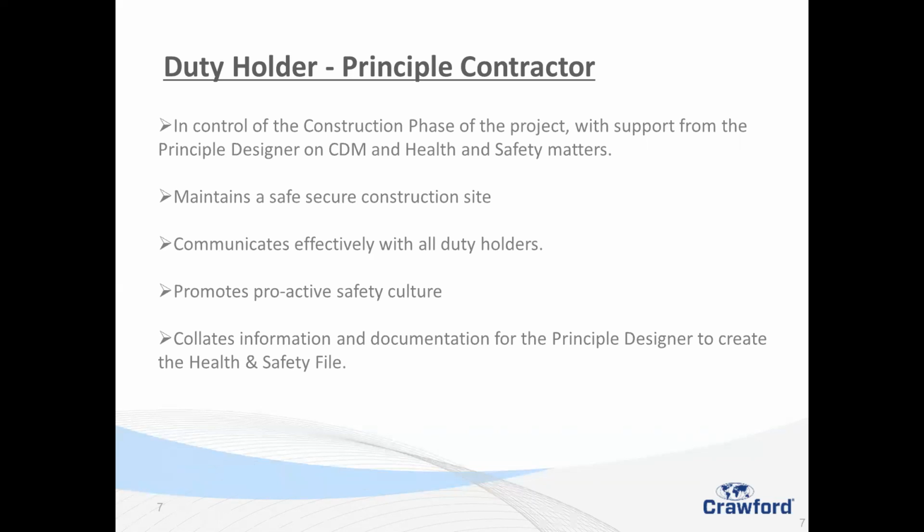They actually collate all the information that we need: electrical certificates, gas certificates, building control certificates, and make sure that they can send them through to us so we can create the health and safety file. I make a great point of being able to do each part of my unit's operations, so I know the problems that we are going through, and if I see that any of the principal contractors' duties are not fulfilled.